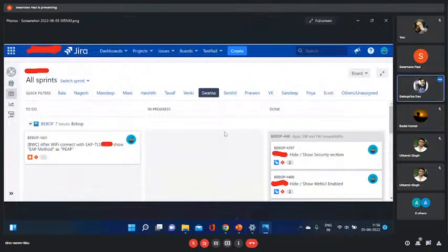So this is actually how a Scrum board works. This is my Scrum board. Suppose this is the issue, the requirement analysis part where things are added. Suppose it is a bug. Every bug is assigned some ID, and with that ID the bug name is written. Then you need to understand the bug and fix it. While you try to fix it, you send it to the in progress part, and after that is done, you send it to the done part.